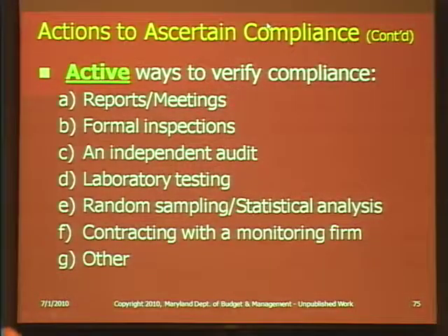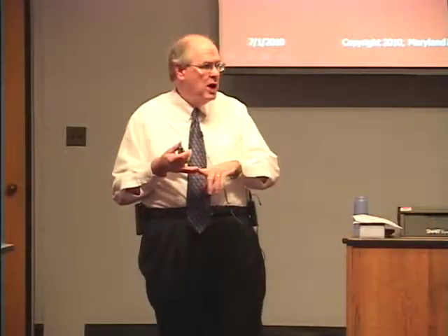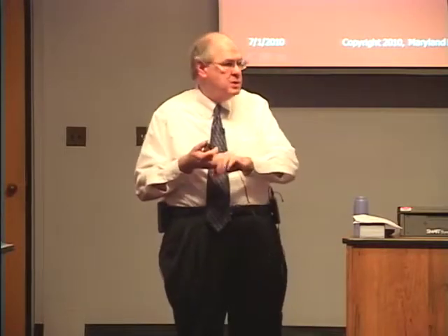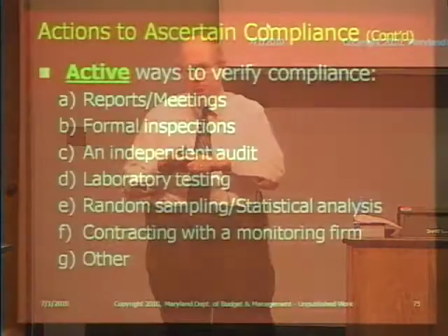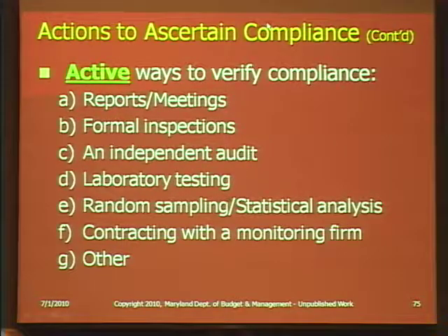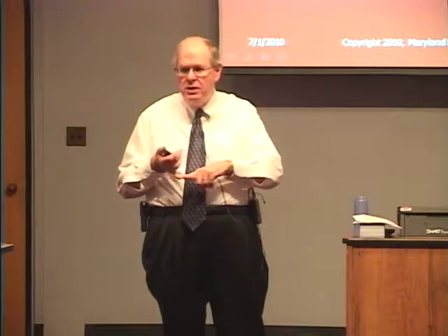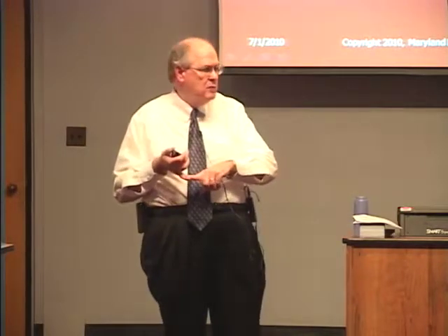You can have inspections, either by state personnel or personnel of other contractors, who will actually go in and do a formal inspection of performance to ascertain whether the vendor's doing what they're supposed to. If it's something that does not lend itself to inspections, an audit is the same thing. Financial records or various things that they're doing. Sometimes we will get a vendor to go in to audit a vendor's performance. The legislative auditors many times will do some kind of auditing of vendor's performance. And if it's not being done as specified, they will write up the agency for having contractors being paid for not doing what they're supposed to do.